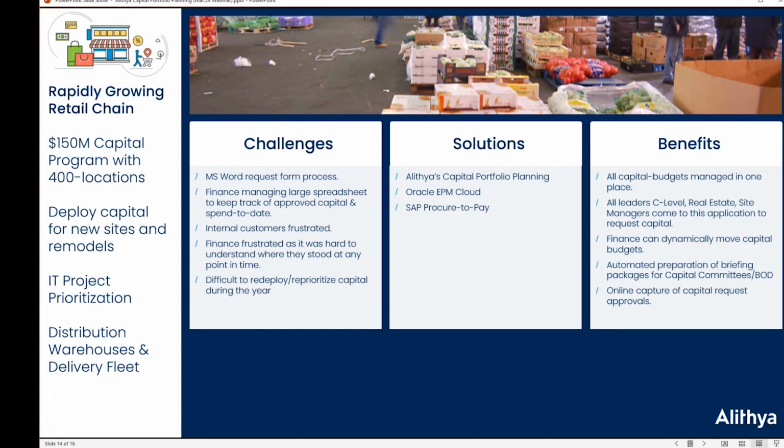So they did adopt the capital portfolio planning accelerator that Todd walked you through, and that was their foray into the Oracle Enterprise Performance Management Cloud. What was interesting is they actually used SAP's procure-to-pay system. As Todd was showing, one of the real benefits here is building that bridge with your procurement tool. In this organization, it was an SAP procurement tool, and every day we would get an update of the open PO balance and the invoices that had been charged against each capital project, and we were able to send back to SAP, hey, this is the budget for each project.